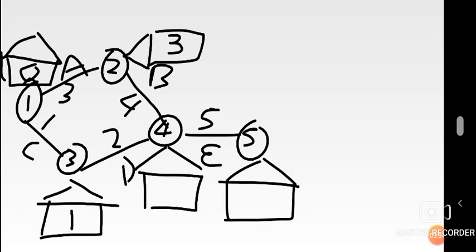Okay, next. Then if anything, what else do we have this side? You can also have 3 to 4. 3 to 4, what would be the start time on 4? You might say, okay, at point 3 we have 1, right? So it's like you add on the activity that's going to 4. There's a 2, you would say 3, right?